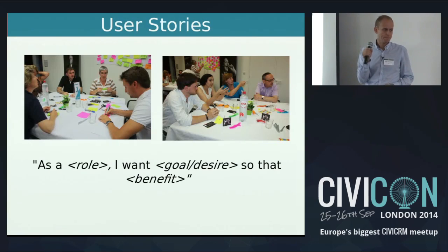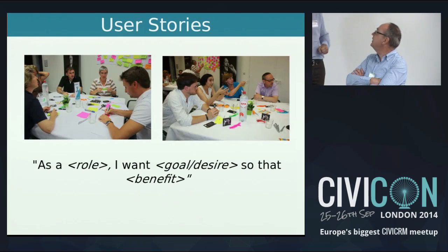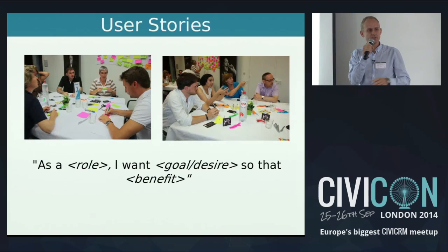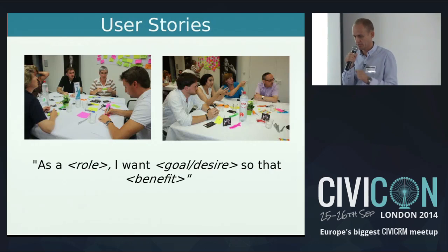We had about 100. Yes, we had about 100 user stories. And after the session, we took all the post-it notes and we entered it in a ticketing system. So it's just a system where you can record these things so we could follow up what we have.